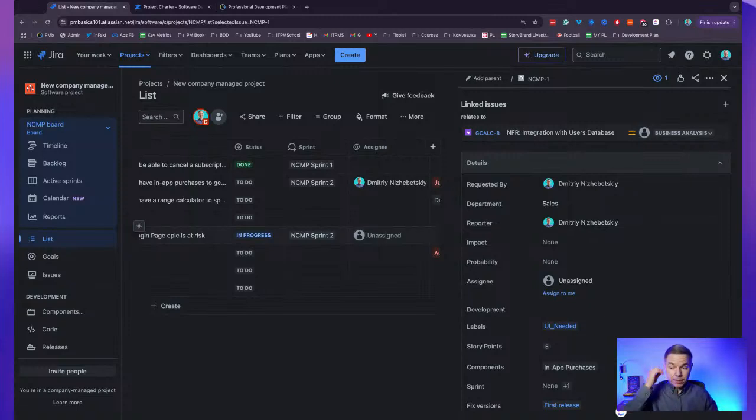So I think that if you follow the whole set of advices and you have releases, so you're operating with just 2, 3, 5 sprints at a time. And if you have epics, then you can always go to the high level and manage them on epic level rather than on user story level. So it all depends on the number of epics. And my rule of thumb is, all right, during a sprint, it's totally okay to manage about 20 user stories, I would say. During a release, you can imagine it's like 100 user stories, if you have a business analyst and mature team.